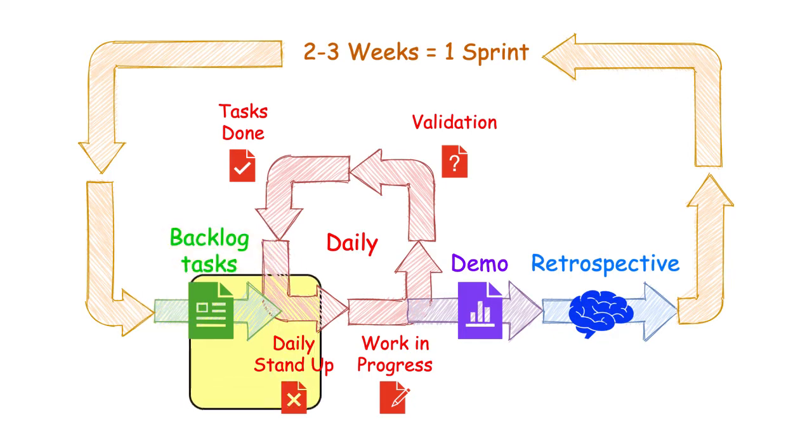And it starts with what's called the daily stand-up. In software development, the daily stand-up was done literally as a stand-up. In the morning, everyone on the team would stand up and answer the questions: what did I do yesterday? What am I going to do today? And are there any impediments?